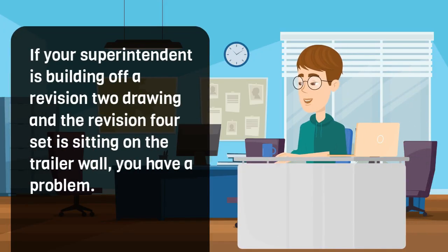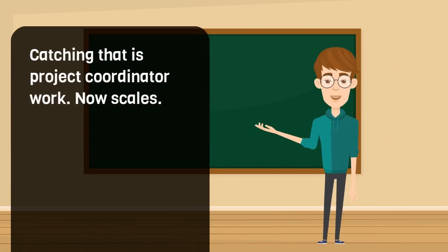If your superintendent is building off a revision 2 drawing and the revision 4 set is sitting on the trailer wall, you have a problem. Catching that is project coordinator work.